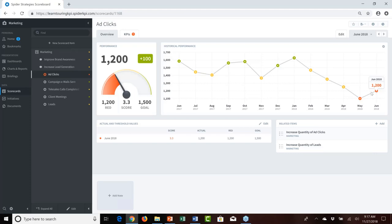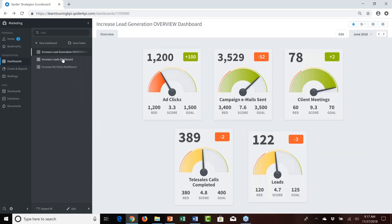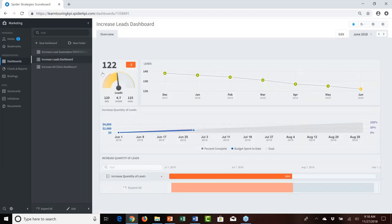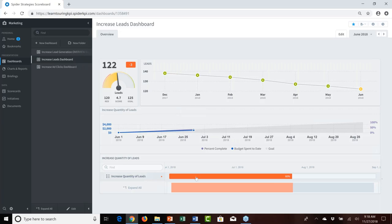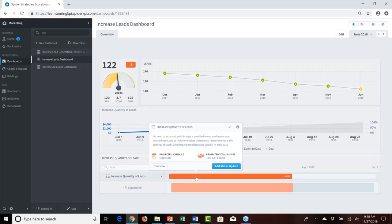We acknowledged it might be easier to consolidate views of our initiatives, tasks, and associated KPIs rather than navigating back and forth. So we created additional dashboards. The first is the Increase Lead dashboard — showing the leads KPI historical performance and below it the initiative progress. At the end of June, the increase quantity of leads initiative was 30% complete with $1,100 of the budget spent.